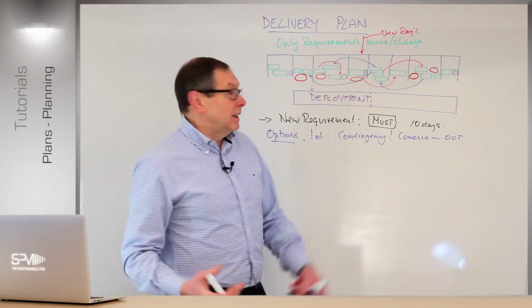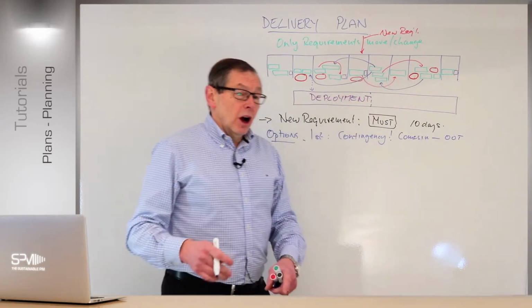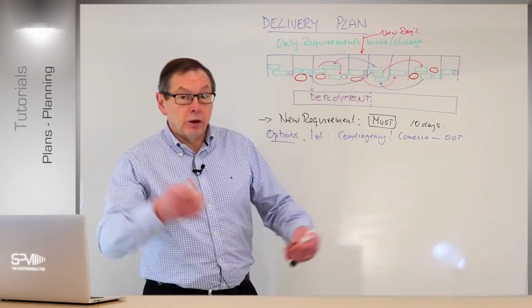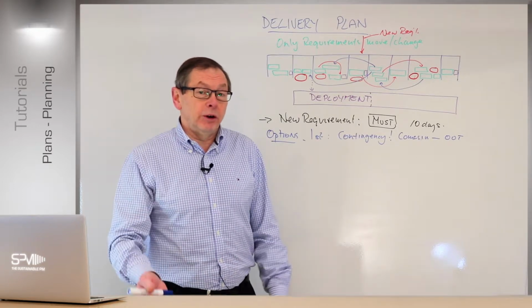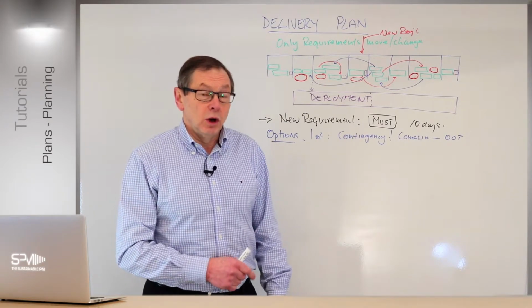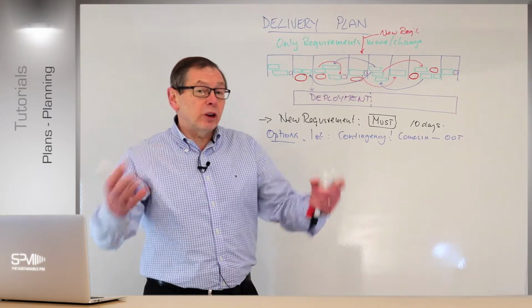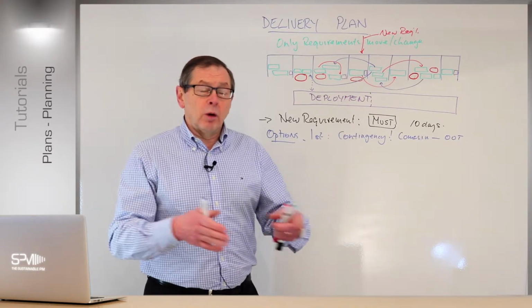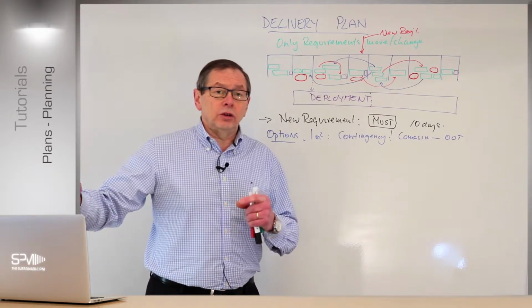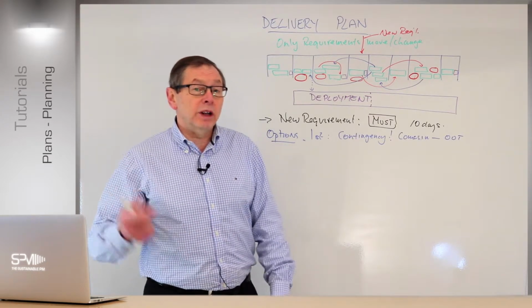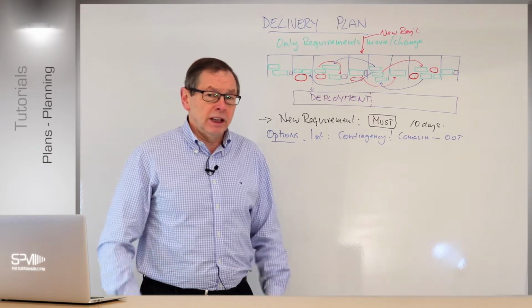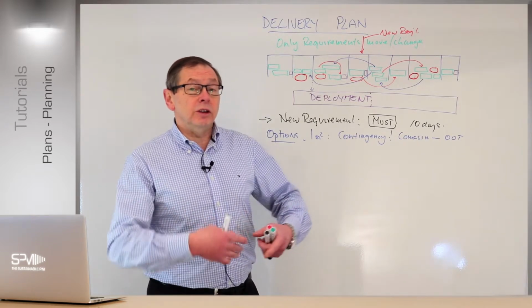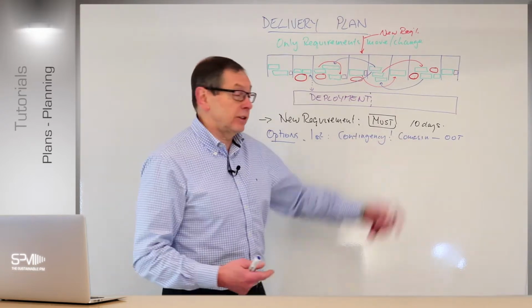Now, hopefully that will be the case. I'm able to move either a group of requirements, usually ones that aren't so critical, right? Like the could haves, for example, which may be moved further down the list to make way for the new requirement, or a mixture of coulds and maybe a couple of shoulds, or maybe something grouped around a particular requirement itself. You might decide one page on the website isn't quite so critical. You can make it a should have for that website, or even a could have for the moment, like resources or something. You need to have contact pages. Or another section, the policy document. So you've got to think, have I got the contingency? Is there something I can move out at the moment to make way for that 10 days?